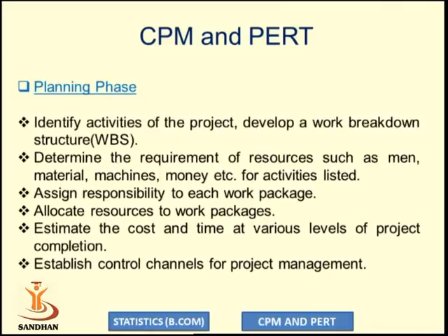In the planning phase, we have to identify all the activities of the project and develop a work breakdown structure. We have to determine the requirement of the resources such as man, material, machine, money, etc. for the activities listed on paper.